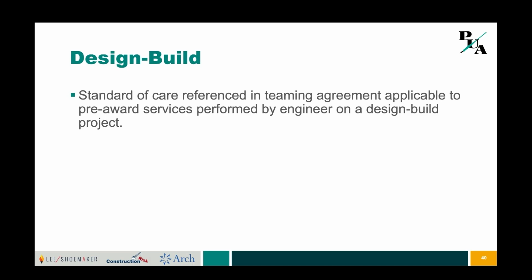Fast forward, the project gets awarded to the design build team, and the design builder's project services agreement with the engineer includes a standard of care provision that omits that language about the services being, quote, adequate and sufficient for the bidding language. The contractor alleges that there was a horrifically flawed pre-bid design concept that was only discovered after award, and the engineer, not wanting to have this terrible language from its teaming agreement introduced in front of the jury, sought to prevent the design build contractor from introducing or referencing the teaming agreement standard of care provision, arguing that the project services agreement included an integration clause and superseded or trumped the standard of care provision in the teaming agreement.